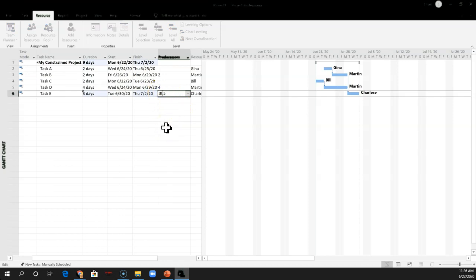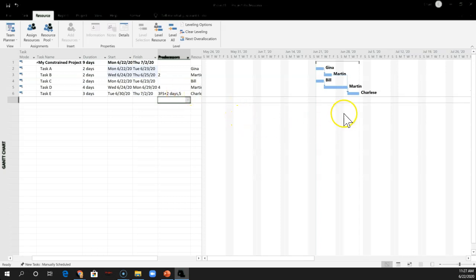It's a finish to start dependency plus, well, how many days? It should be half of the actual time. So we have 4 days, so half that, we're going to put a buffer of 2 days. And it automatically types out 2 days for you.